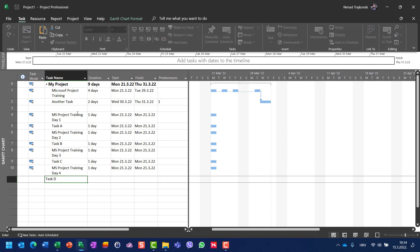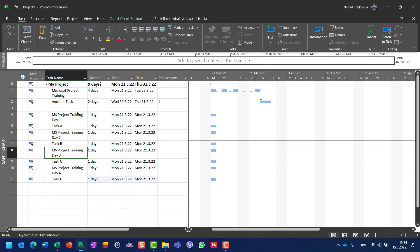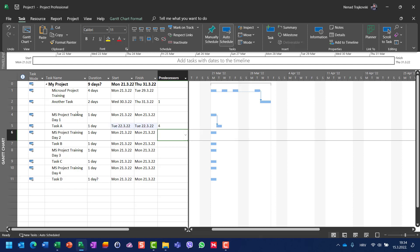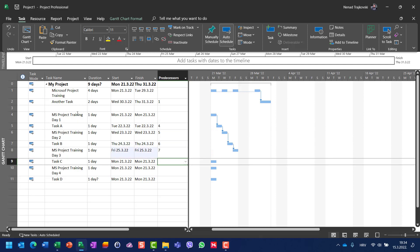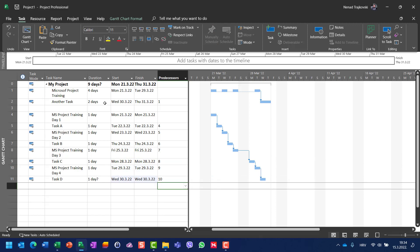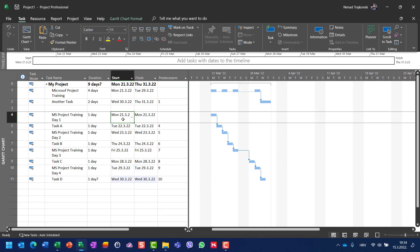Now I can say Task A is supposed to be when Day One of training is finished, so I will link them. You will see that my project will start on Monday and be finished on next Tuesday as here, but in this example on the second part of the screen,